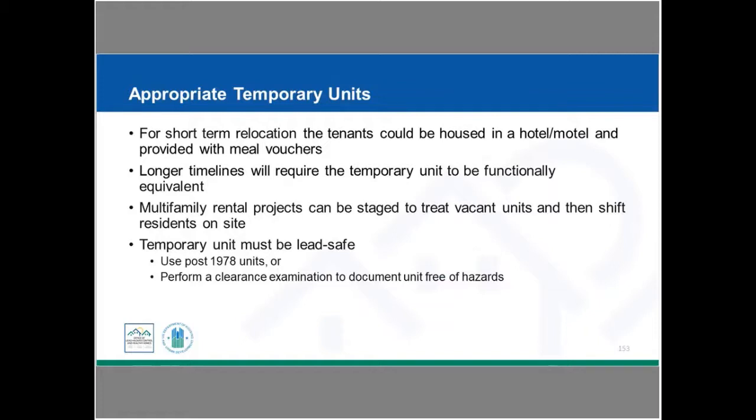So, as I mentioned, when we think about an appropriate temporary unit, if this is something that's going to be completed in just a couple of days, we may be paying for that household to stay in a local hotel or motel. If that unit has cooking facilities and equipment, we may be able to simply provide the nights of housing. In a lot of cases, they won't have full facilities to prepare meals, and so we would also provide meal vouchers for them. And really, the length of time we're dealing with is going to prescribe what kind of facility is appropriate. If someone needed to be out for a more extended period of time, then maybe something like renting an apartment would be more appropriate.